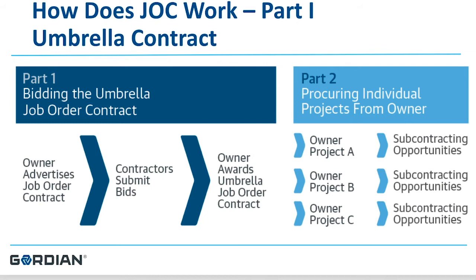Restroom renovations, roofing replacements, HVAC systems — all of those types of scopes of work can be ordered under a job order contract. The scope of work of a job order contract is whatever you can find within the construction task catalog. The price book becomes the scope of work.